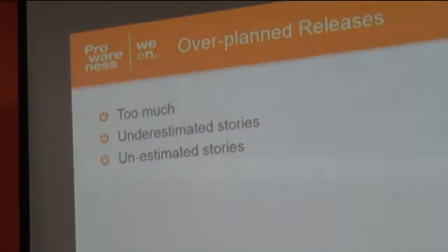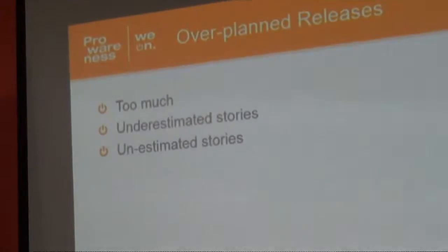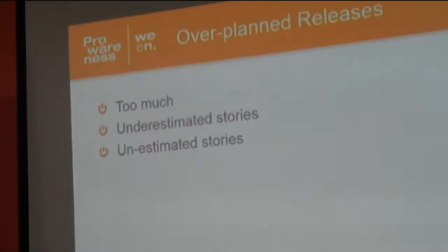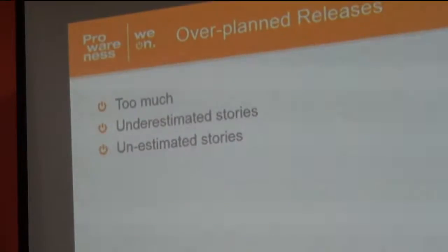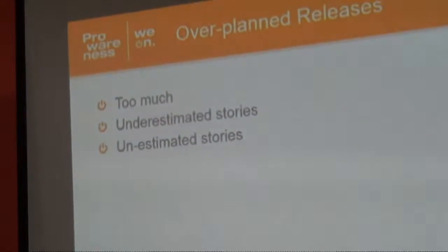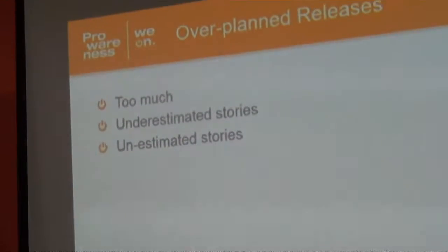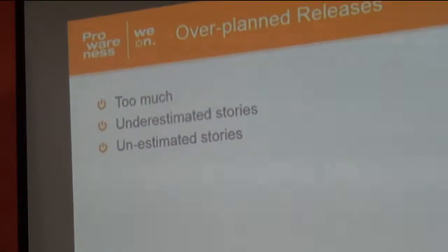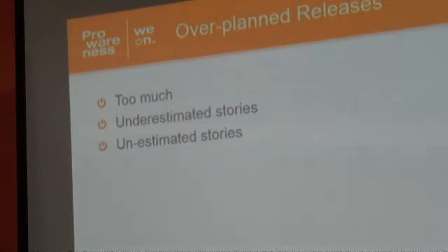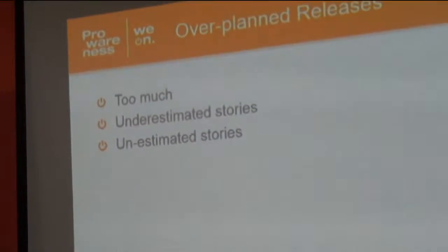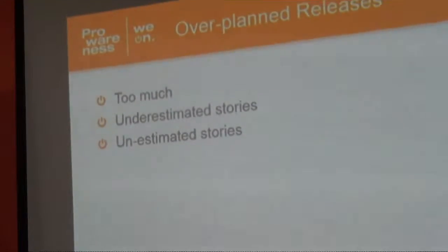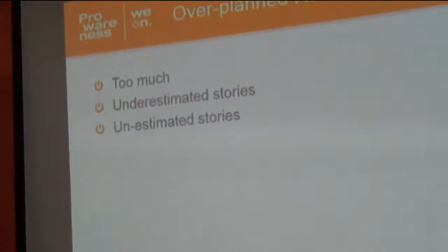And this is the underestimated story. Right? So you say, okay, I've done a rough sizing, so I'm going to put this in my backlog. And when you break it down, you end up with stories which aren't really known at the point you made that release. Right? So this point specifically tended to catch most POs unawares. It looks good when you start your release plan, right? You've got 10 story points with maybe 3 unestimated stories. And then as the sprints went, you estimated the stories, but you didn't compensate either by reducing scope or changing the time.